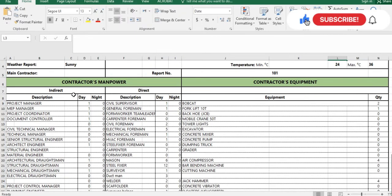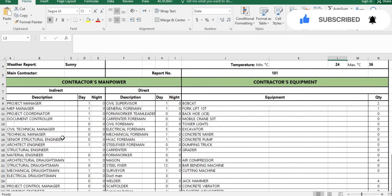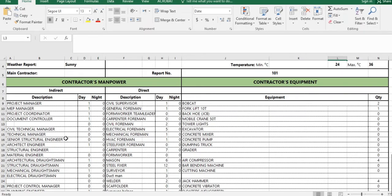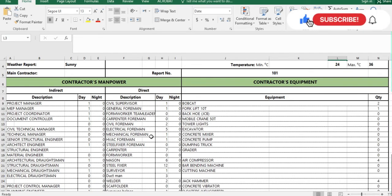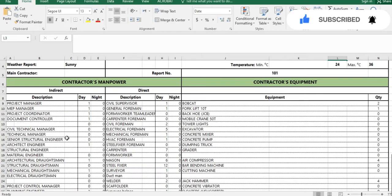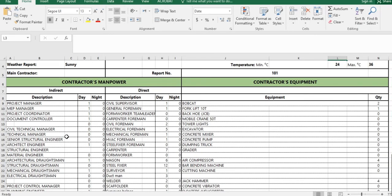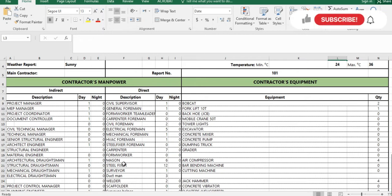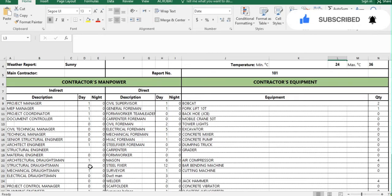Now for the contractor manpower: what is the difference between indirect and direct manpower? Indirect manpower are the management engineers working at site, at offices, and outside. Direct manpower are labour, supervisors, general foremen, technicians, and similar roles. You have to record how many engineers, supervisors, foremen, electricians, carpenters, masons, steel fixers you have at site. You get this data from the timekeeper or site admin.